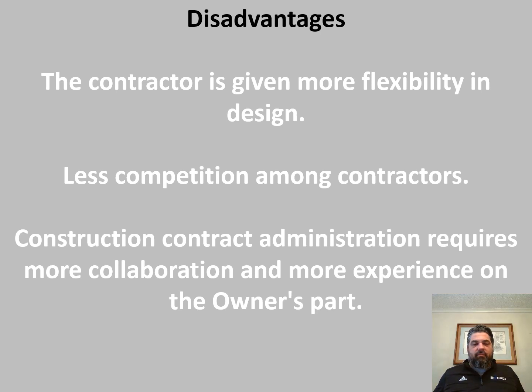The construction contract administration requires more collaboration, and really, this is a big deal. It requires more experience on the owner's part, because it sets up a scenario, because they don't have anybody acting on their behalf, where the contractor could be preparing or constructing work that wouldn't meet the specification standards that you would typically see, or may not meet code, or also a whole host of things, because they don't have a design professional to act as their agent.